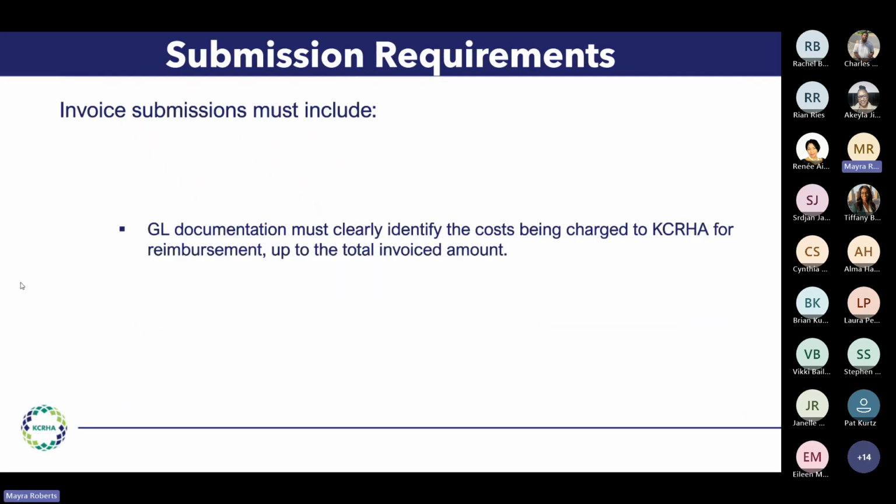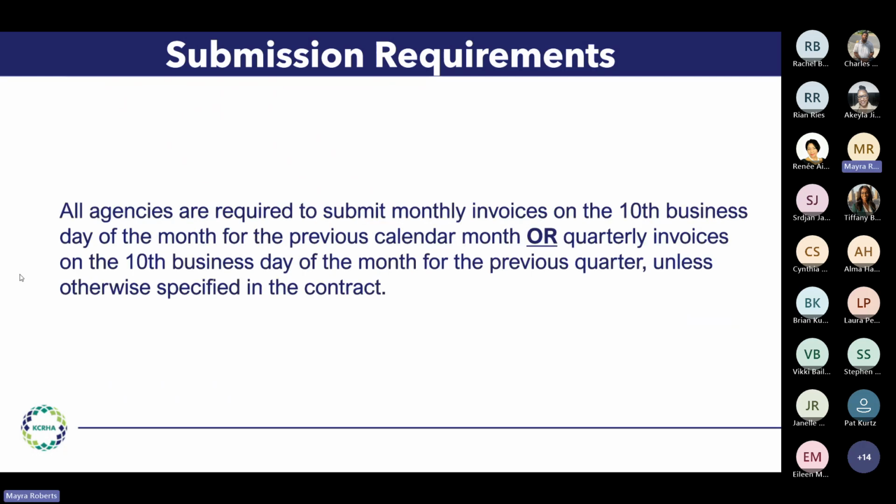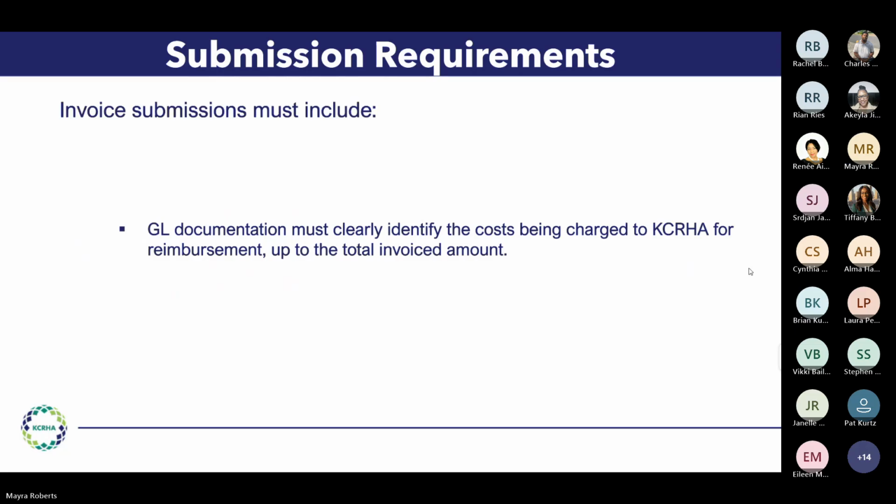All agencies are required to submit monthly invoices on the 10th business day of the month for the previous calendar month, or quarterly invoices on the 10th business day of the month for the previous quarter, unless otherwise specified in the contract.